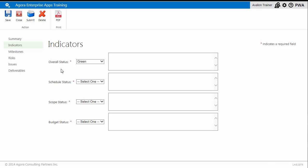Each indicator is set individually, and the overall status cannot be set to a more favorable status than the worst child. In this example, my schedule and scope status is set to yellow.